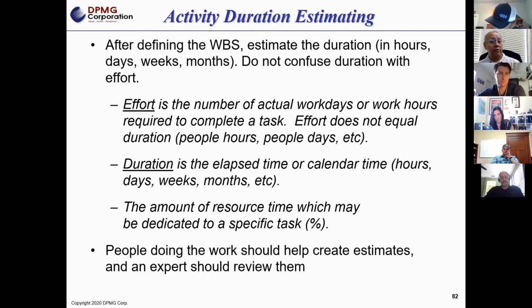Oh yeah, absolutely. So again, in the example I just showed where it said the MIT person in the application, it's saying for this task I need someone who knows the hardware side and someone who knows the software side. That equates to two different resources. Now that may be one person who can do both, but I need to make sure whoever performs the work understands the hardware side and the software side. So yeah, the answer is yes.